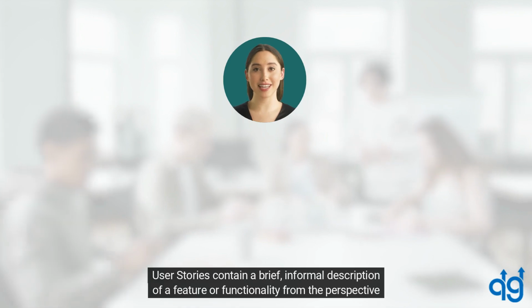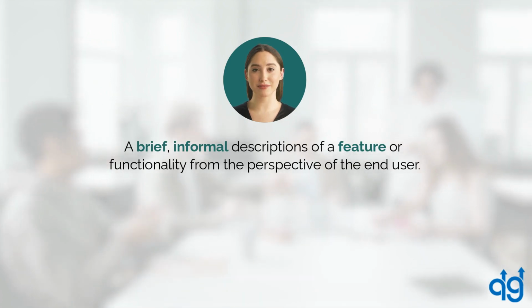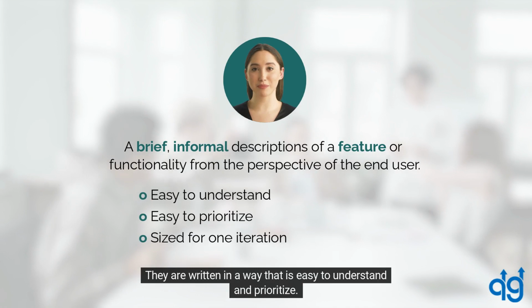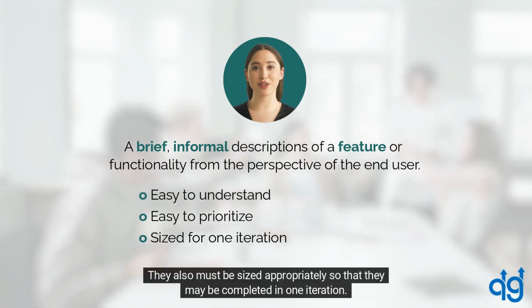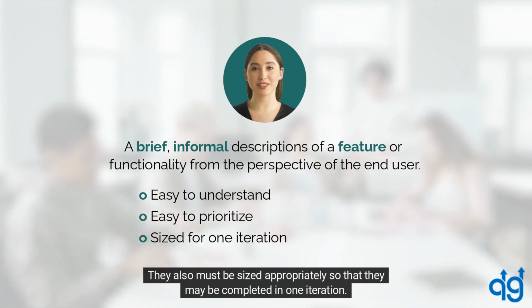User stories contain a brief, informal description of a feature or functionality from the perspective of the end user. They are written in a way that is easy to understand and prioritize. They also must be sized appropriately so that they may be completed in one iteration.